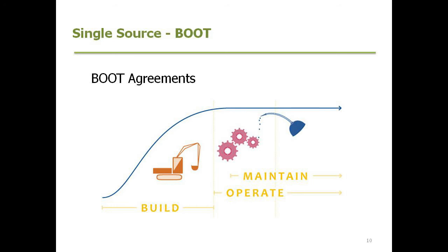So the builder is actually entering into an agreement where he won't only be involved in the design, construction, handover, but that handover will be later because he'll also maintain and operate that asset or building for a certain period of time. This form of agreement's really popular with governments, particularly for roads, prisons, tollways, and in Australia now even hospitals.